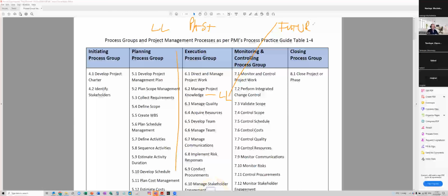And I'm not waiting until closing to finalize this. As soon as your kickoff meeting is completed and until the lessons learned register is done, you keep writing them down on a piece of paper, something like this. And once you have the lessons learned register, you keep updating the register on a regular basis. Okay? Does that make sense with everyone? Yes.